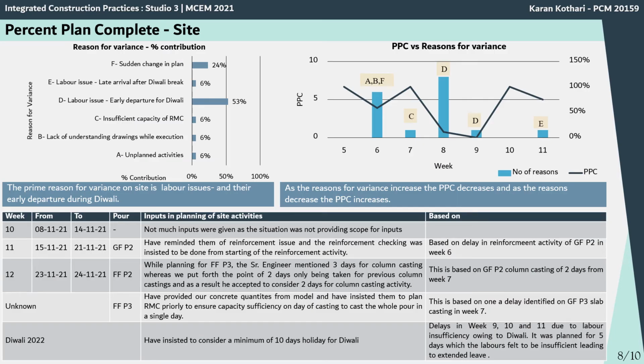Coming to the site PPC, PPC analysis was performed for site activities, in which we tracked the site activities and computed the PPC, and the causes of variance between the planned and the actual were also documented on a regular basis. Here the graph depicts the site PPC in relation to the causes for the variance shown.